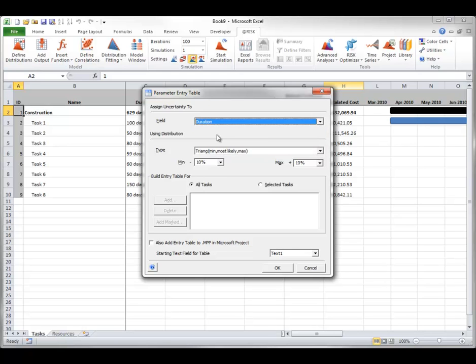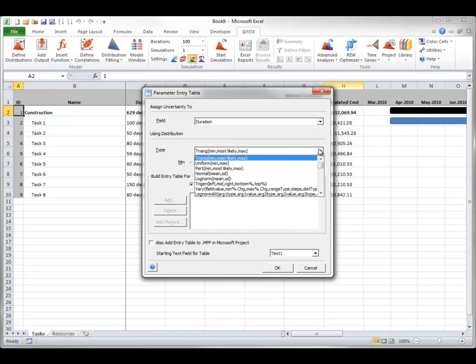The Using Distributions section lets you select the At-Risk distribution that will use values from the table. These values create a probability distribution specifying the range of possible values for each task's duration and their relative likelihood of occurrence. For now, you can use the triangular distribution, which takes minimum, most likely, and maximum possible values as arguments.